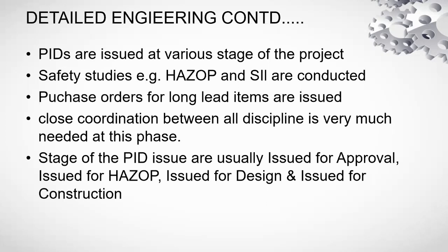Purchase orders are being prepared or developed for these items. As I said, the expected duration for this is 18 to 22 months, but for some of the items the supply period lasts for 20 months, including turbines and all the turbine vendors.